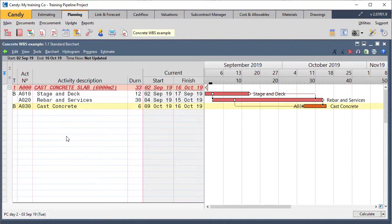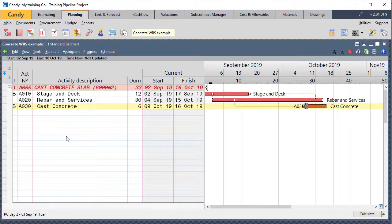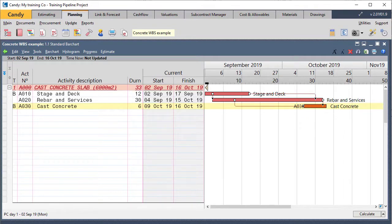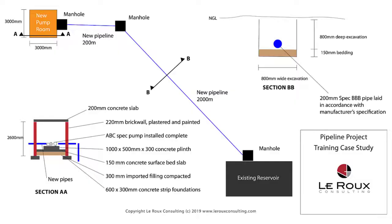Now the problem is usually that once you commit to your works breakdown structure subdivision and your level of detail, you're kind of stuck with that for the rest of the project. And it becomes very difficult and uncomfortable to change that mid-project. And that's why it's so important that you spend a lot of time conceptualizing your works breakdown structure, feeling it, thinking about the most effective way and level of detail that's going to allow you to monitor and control the project on the level that it needs to be controlled at. So let me show you how I would approach this pipeline project of ours so that you can just get a glimpse of the process and the way in which I make my decisions.